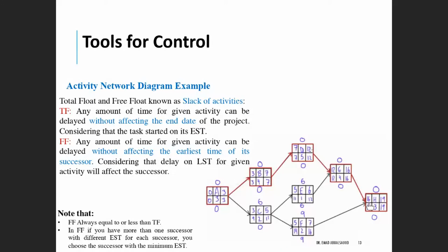And that's why here we have to keep the 16 all the time coming from the activities G and F. In our case, the G is already fixed, we cannot change it, and all the path here will not affect, but the activity that can affect the early starting time for H is F, and F depends on the C.